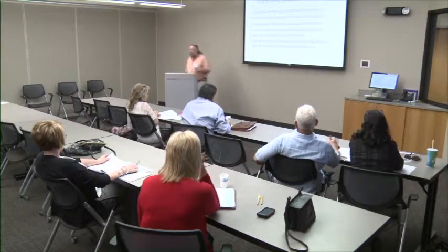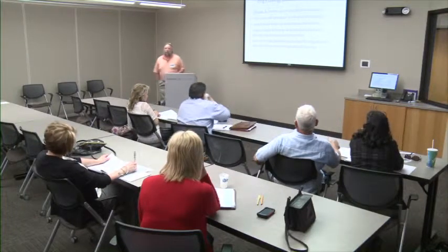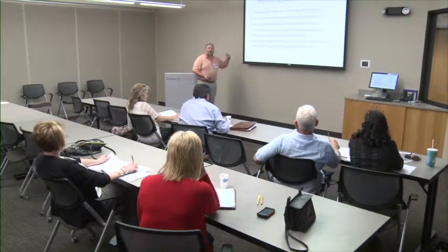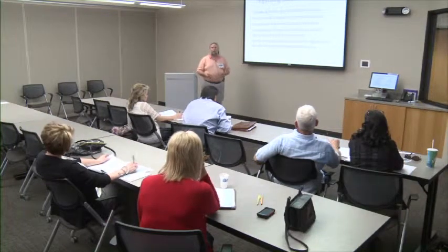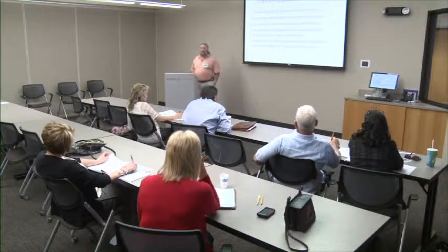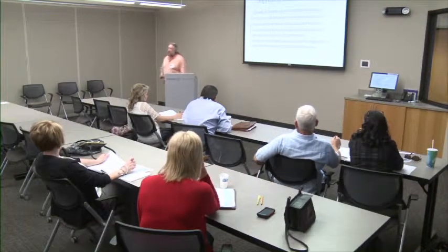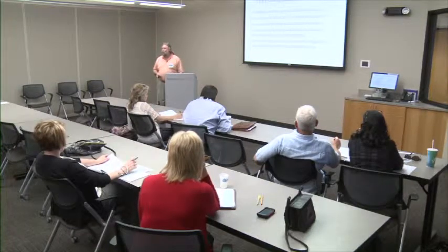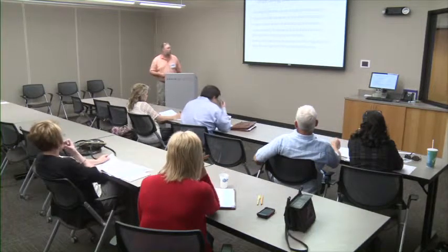So get the people that are going to be doing the work. And by having those people's input into the schedule, they now have a buy-in. Because when they say, well, I can't do it in that amount of time, the answer is, well, 6 months ago when we put this together, that's what you told me you could do. So now they're responsible for it.